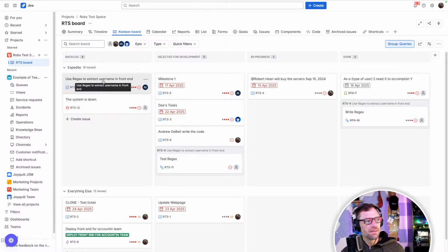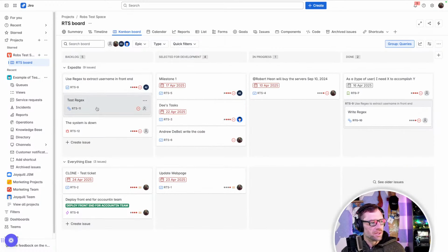I imagine, actually no, I'm going to stop. I'll have to go test that out. I'll put this back under its parent just so it's in one spot. But something for the exam is subtasks cannot have subtasks. There's only one layer. And typically in groups we allow developers to build their own subtasks.